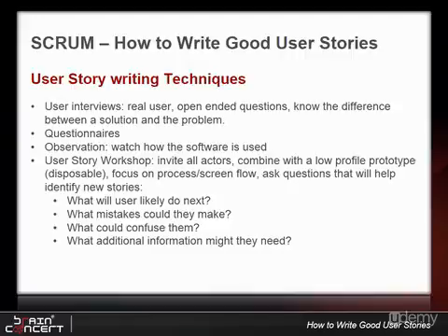Write for one user role, avoid plural. Write in active voice. The customer should write, developers are free to suggest. Write short titles. Start with the goal stories for each role. Decompose from there. Slice the cake. Write stories that will deliver end-to-end functionality. Do not split on technical lines.